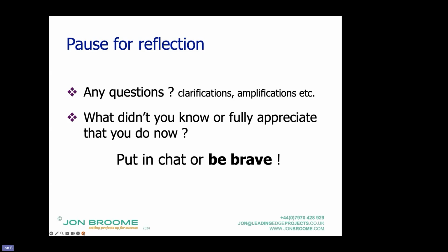So Oliver has asked, is it fair to say that a target cost contract requires a much more intelligent client than an activity schedule, as this involves assessing and setting the target cost? Pre-contract, yes, probably does. You can still do an open book tender, but generally, when you consider frameworks, you might be getting up, and this is off the top of my head, 70 to 80% are negotiated, built up on an open book basis, I would say.